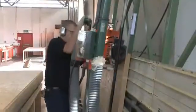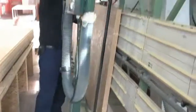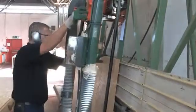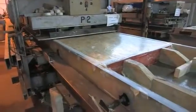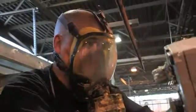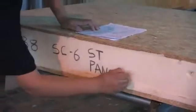Lakesmere were looking for a unitised walling solution which incorporated the installation of external finishes such as standing seam zinc finishes and the integration and installation of glazed units within a factory environment prior to delivery to site. The solution was to use a factory-manufactured timber structural insulated panel, or SIP as it's known, comprising an outer frame of sustainable FSC-certified timber board, assembled and injected with ozone-depleting polyurethane foam, thus producing rigid story-height panels 2.7 metres in